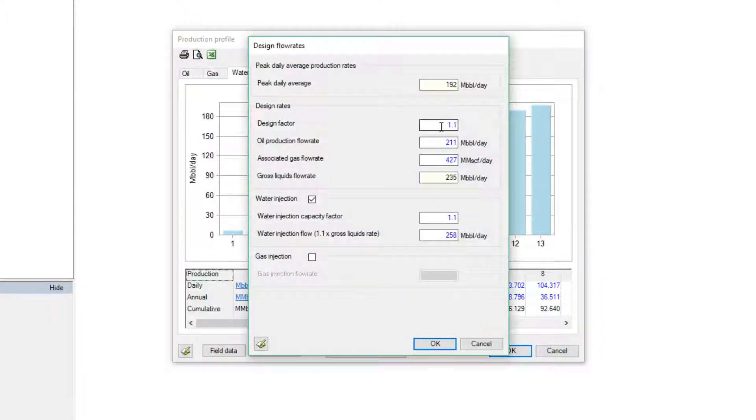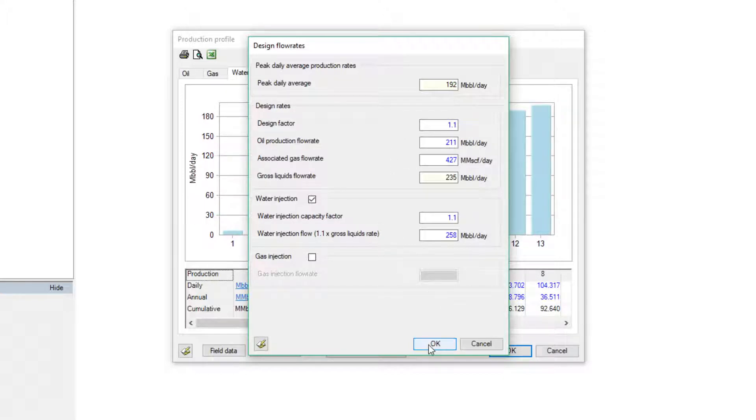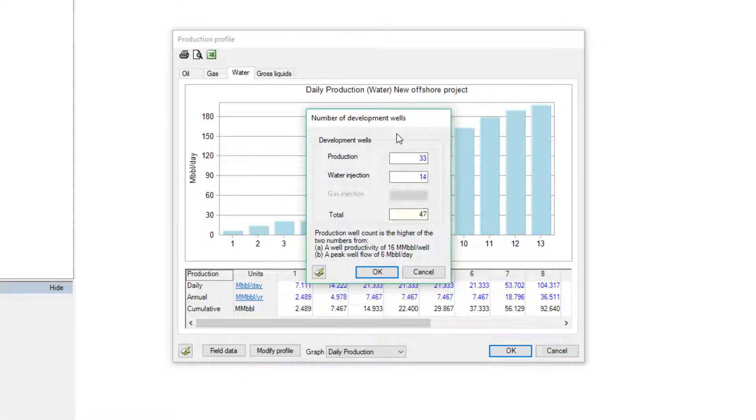The sizing of the installations is primarily defined by the production profile and the swing factor. Taking into consideration the recoverable volumes, well productivity, and production profile, Quester will estimate the number of wells required for the project.